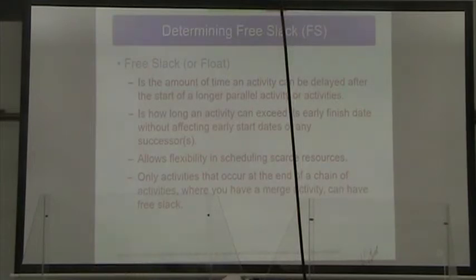But we've got 10 days slack on activity C. We're going to let them use the laboratory first, and then we'll start activity C when we've got B well underway.